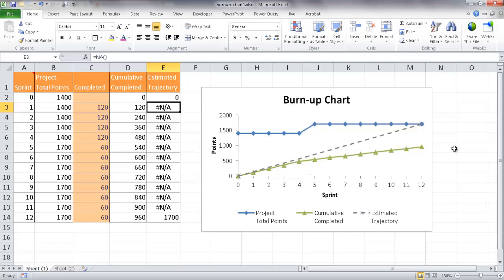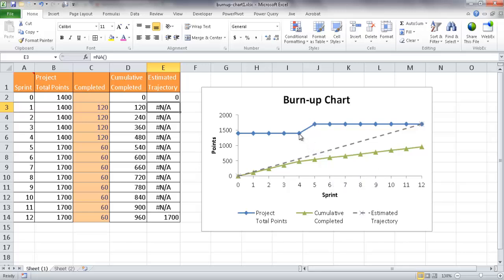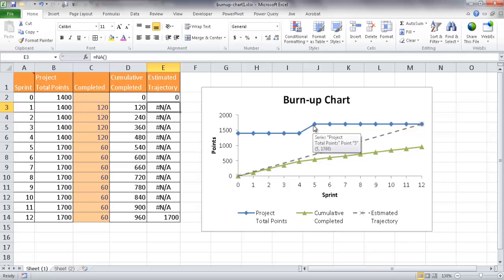So the burn-up chart is one of those charts where it's kind of good to give stakeholders an idea of where the project team is at. And it's also helpful to give a bigger picture of the project. Say, for example, we have this change at iterate sprint number four and between sprint number four and sprint number five. And this can indicate to other stakeholders that maybe there was a new requirement.